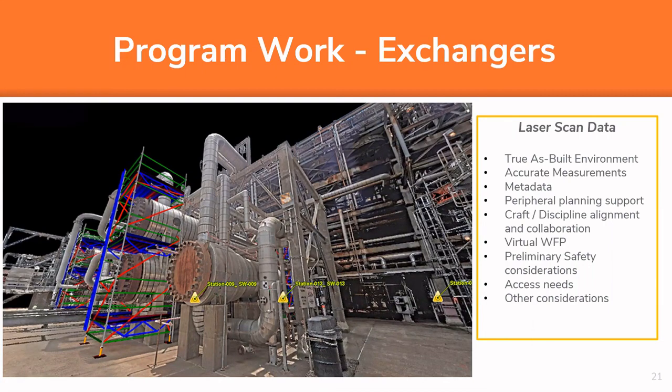And of course, I don't show an option C here, but a traditional approach would be that neither of those are available. And then you would still deploy good WorkFace planning protocol. That would generally mean that the group of disciplines involved in the process could do a joint walk and take a look at the facility, take a look at the exchangers in question, get all the dimensions and agree on the scope of work. It's more manual. So visualization goes a long way, and that's our preferred method when it comes to WorkFace planning, is to have some visualization available to us.